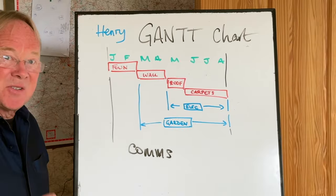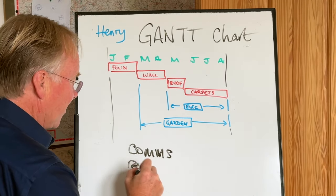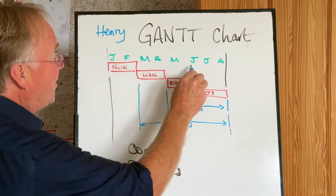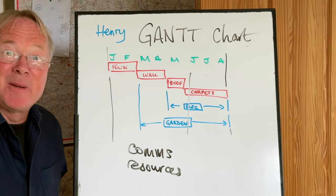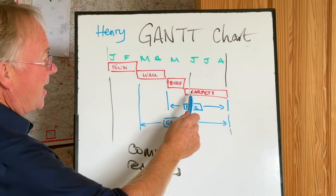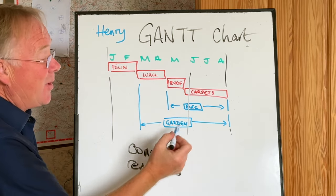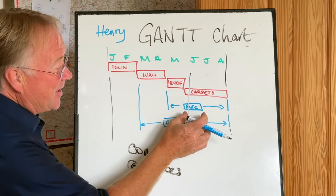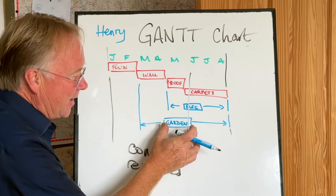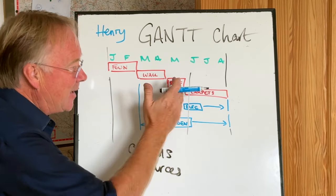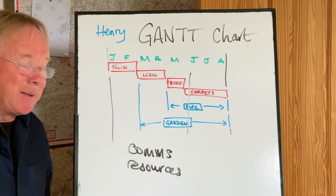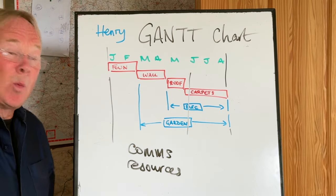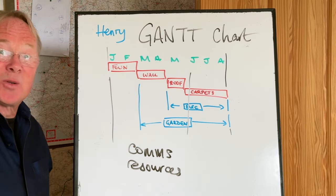The second reason why it's great is you can think about resources. You can look vertically and think, in June we're going to be pretty busy, because we're going to be doing the carpets, possibly the electrical stuff and the garden. But if we move the electrical bit a bit later and the garden a bit earlier, we can get rid of overlaps. So we can see how busy we're going to be well into the future — it's great for resource planning.